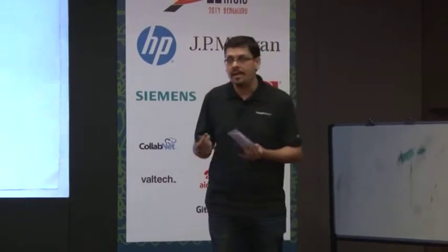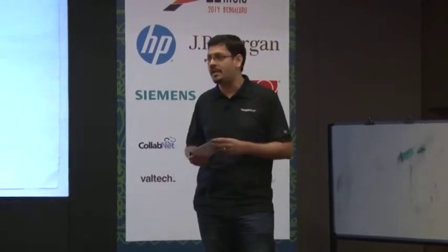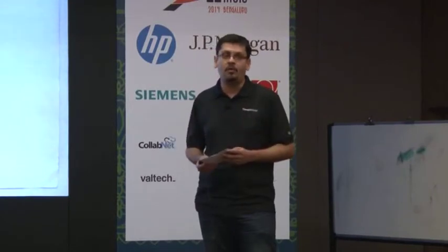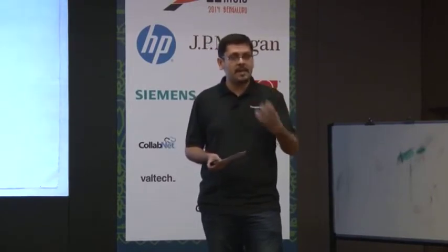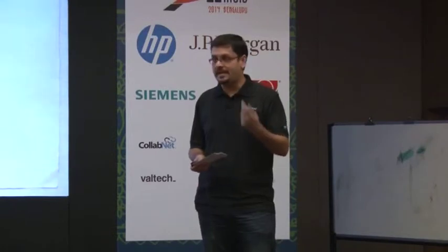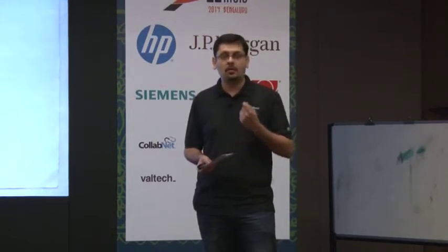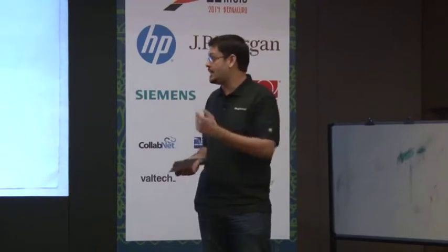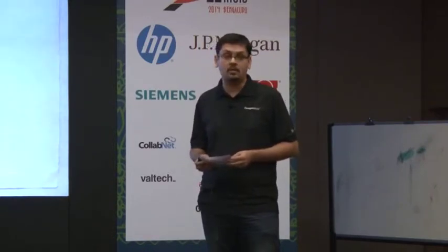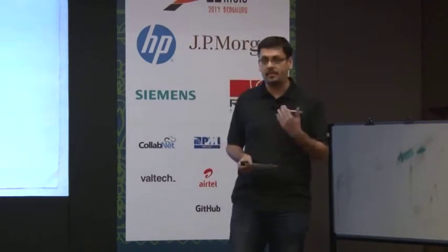And the third thing we look for in these cases is, are there big unknowns? Is the product vision, for example, extremely ambiguous? Is there a lot of discovery to be done? Are there some big chunks that need some validated learning to be done quickly? In those sorts of cases, especially if there's a lot of technical risk, a lot of unknowns around interfaces or technical risk, we'll ask the question, does it really make sense to start with offshore or distributed on day one? Maybe we should look at whether we can start with a small co-located team that can get some of the unknowns uncovered pretty quickly.